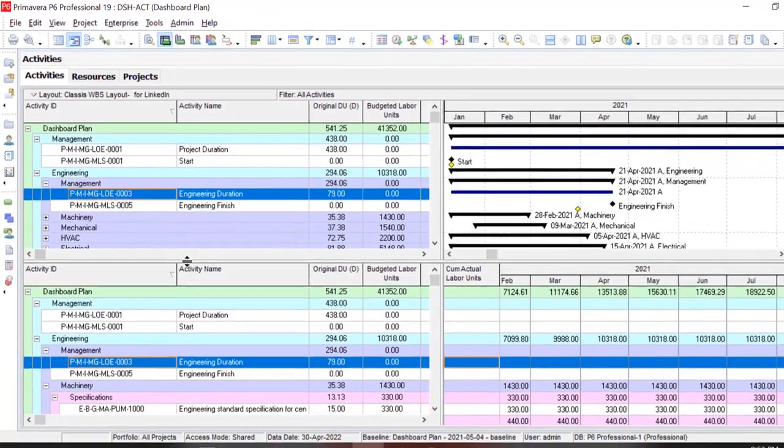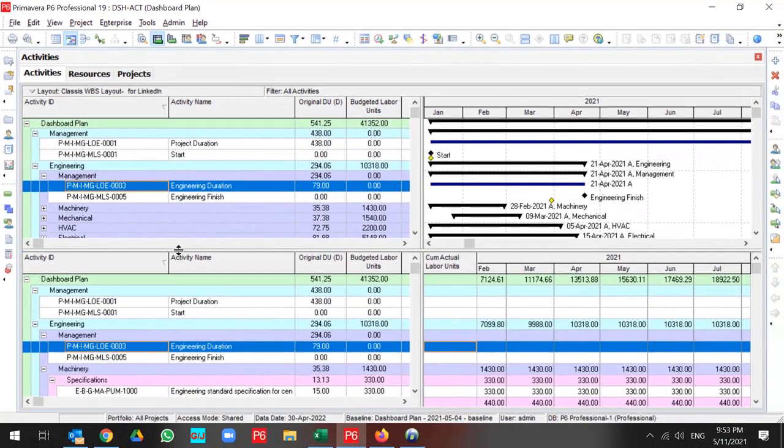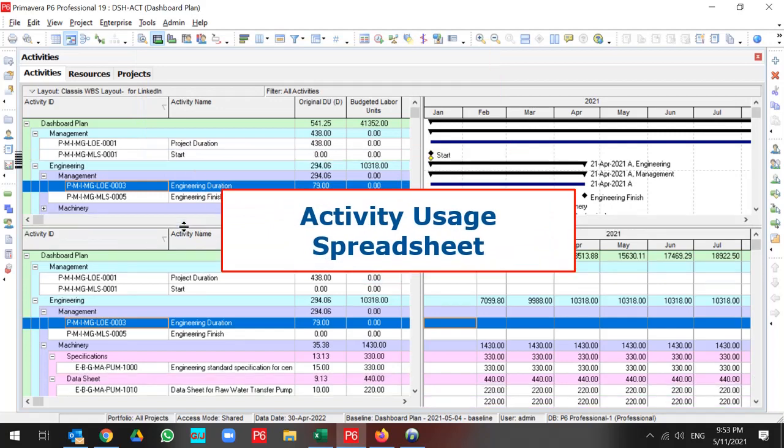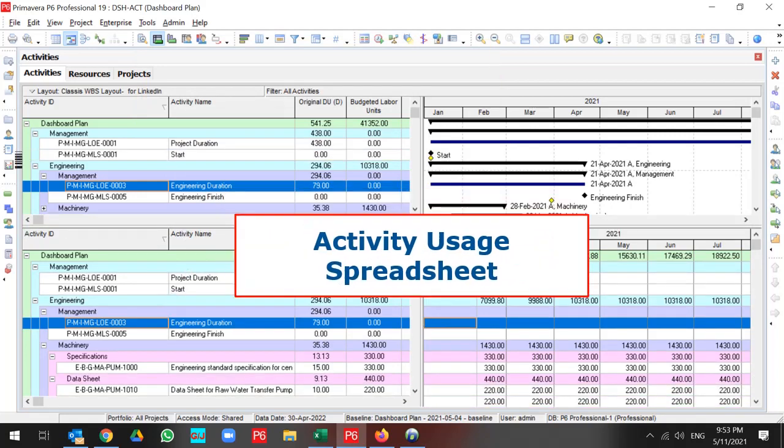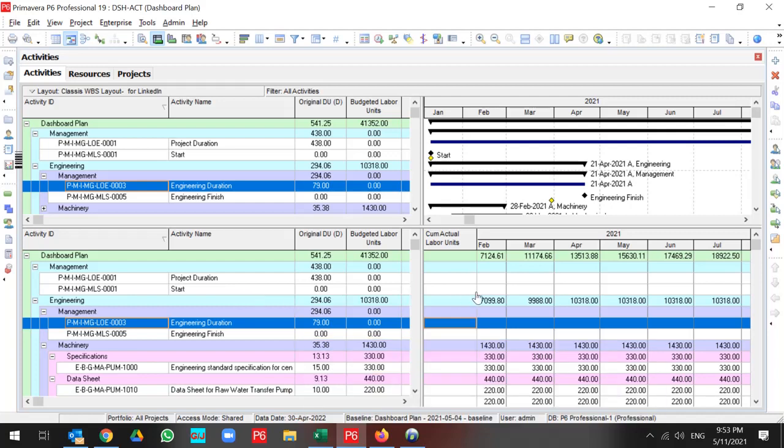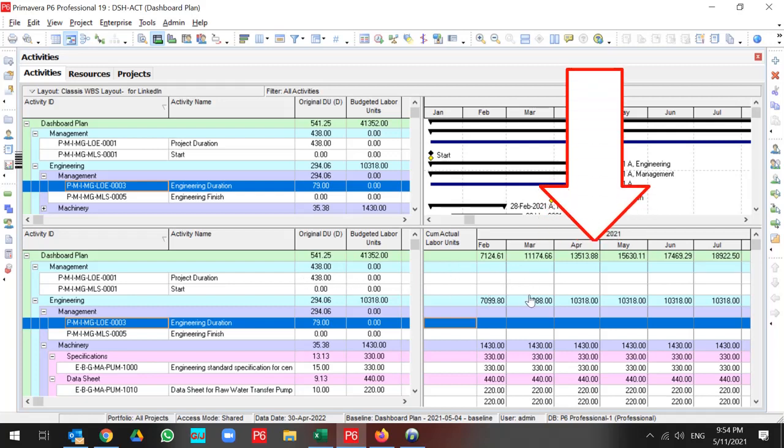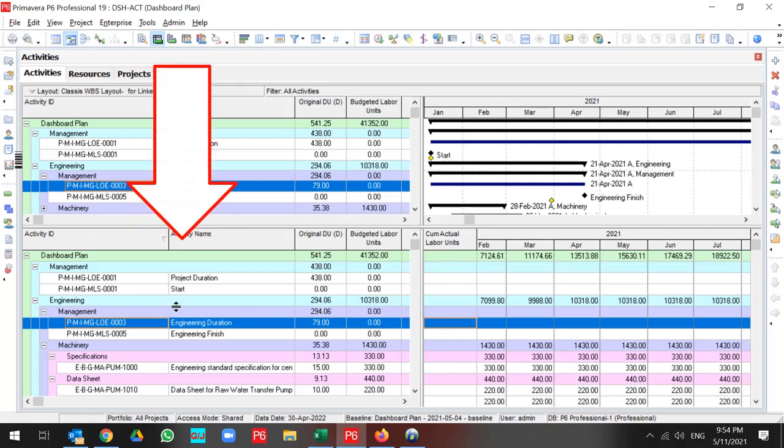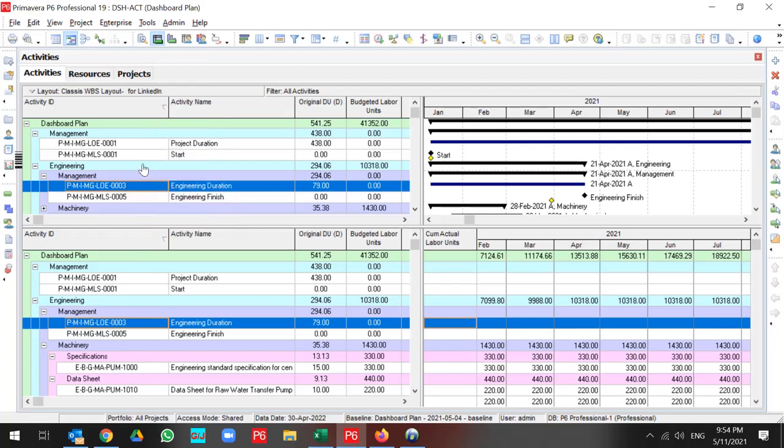But what useful information does Activity Usage Spreadsheet show us? By Activity Usage Spreadsheet, you can find out the distribution of your units, cost, and other tabs in your project. Activity Usage Spreadsheet has two panes. The right pane shows you the distribution of units which you selected on this column, and the left pane is related to your project information, like your Activity section.